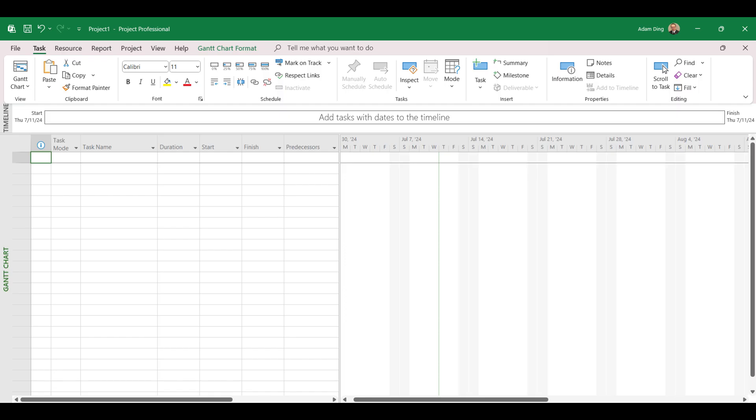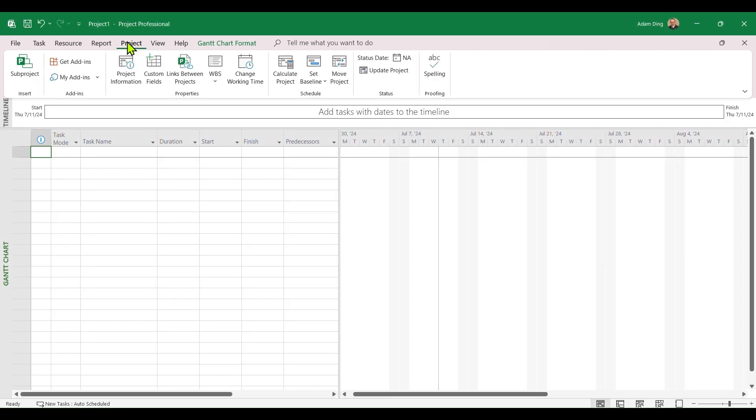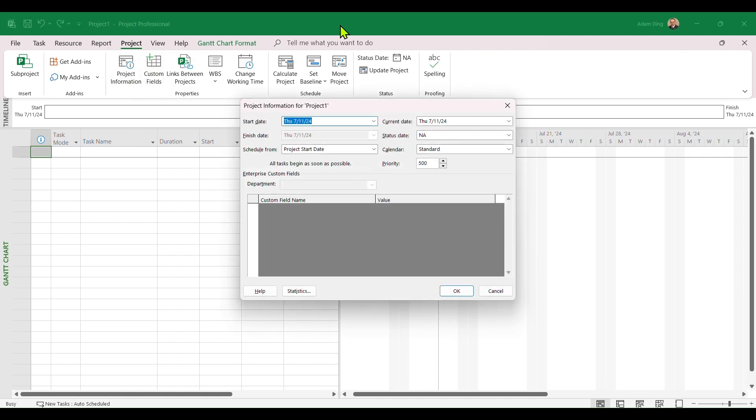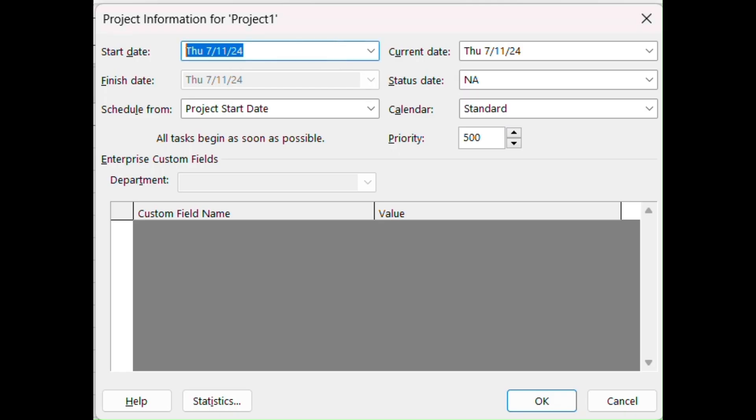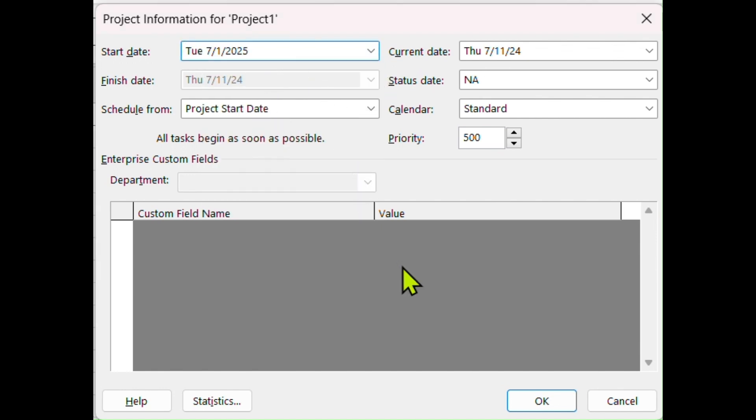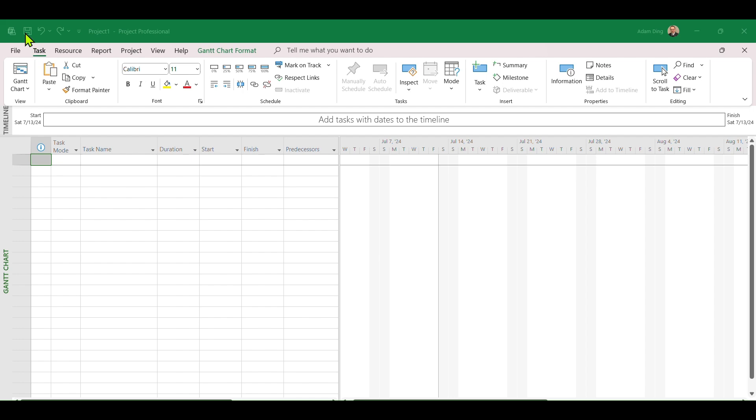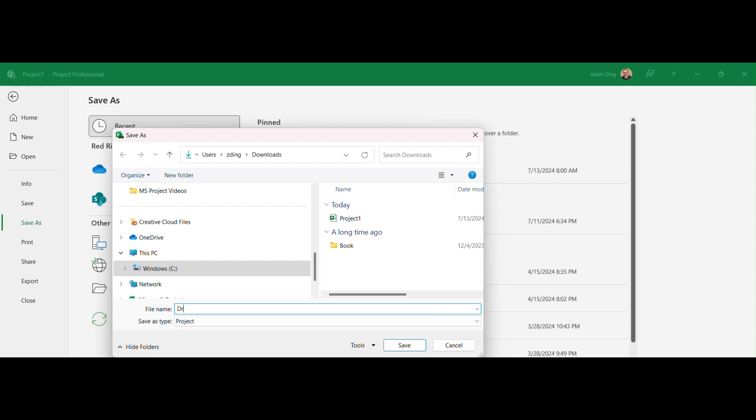To know when the project is done, we need to first specify when the project starts. Under Project tab, in Properties group, click Project Information. In the Start Date box, type July 1st 25, or click the down arrow next to it to display the calendar and select July 1st 2025. Click OK. We have just successfully initiated our project. Click on the Save button at the upper left corner of the toolbar. Pick a location you want to save it and give your project a good name.